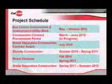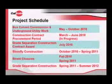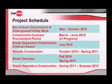But here's the projected schedule. So again, that award is in July. The first thing to be constructed is what's called a shoe fly. And Raphael will come up and go through the project phasing briefly a little bit later to tell you what all these different phases are. But it's essentially constructing tracks adjacent to the current tracks, which will allow us to shift the trains and then build the grade separation where the tracks currently are.